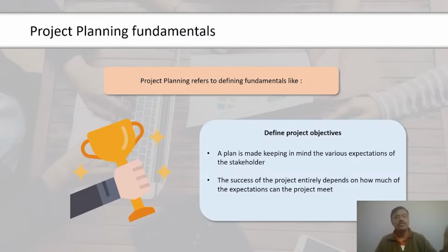Extending this logic, the notion of 6 sigma is reaching a level of confidence that only 3.4 times out of a million would the actual value fall outside the stated range. PERT allows you to plan based on the intended level of confidence in the outcome and determine buffers accordingly. Let's discuss the critical path method in the next screen.